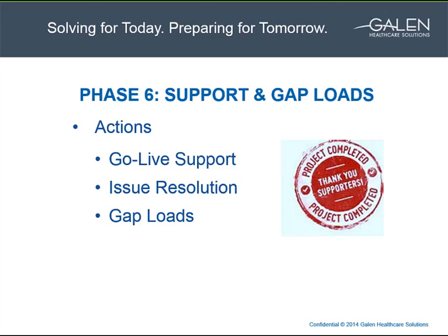So let me just cover what gap mapping means, finally, with all this anticipation. With all the data conversions, the team is working through the project from an extract that's typically taken near the beginning of the project from the production database of the legacy practice management or EHR system. So one of the things to consider as part of go-live planning is how to account for the new or changed data from the time that first extract was taken to the time of conversion go-live. We've seen an example of where a client wanted to deal with that prior to conversion, but there are lots of possible approaches here.